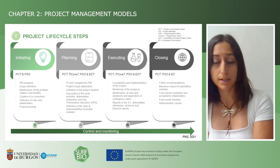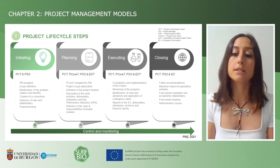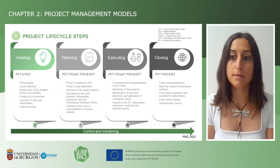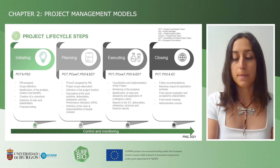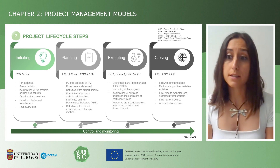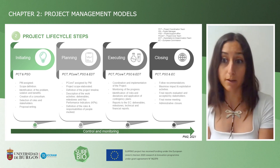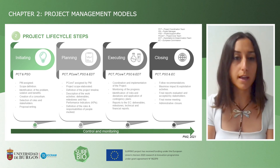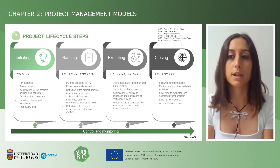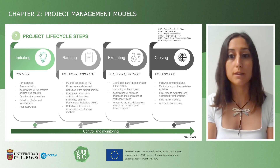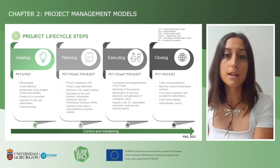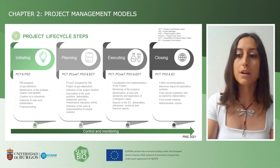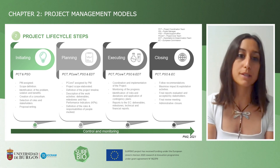The last phase is the closing phase, where the European Commission also has a very important role. We need to follow the recommendations provided within the project, and the aim is to maximize impact and exploitation activities. A final report will be elaborated and evaluated by the European Commission and accepted by the stakeholders. There will be a final review meeting, followed by the administrative closure of the project. It is important to highlight that during all four phases, there should be continuous control and monitoring of the project.